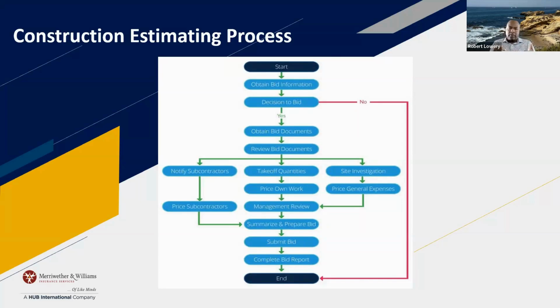Then you're going to be looking at the schedule. It's going to be kind of a high-level construction schedule. It'll tell you the duration of the project, if it's going to be phased, all that, because you're going to use that piece to determine your general conditions and general requirements. You're going to be building that while you're still getting your estimates on the different scope. Within your general conditions, say it's 100 days for this job. So you've got to say, okay, your foreman or superintendent is going to be 100% on the job.